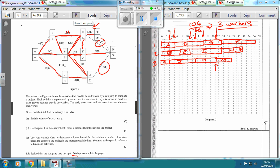Then we've just got L to do. Fast-forward the clock to 27 days when worker 3 can start doing L. That's 5 days, starting from 27 takes us up to 32. And it's all done by the 36-day deadline.